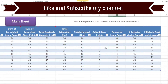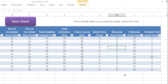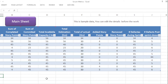In column G you need to add how many total story points were added after the start of the sprint, and in column H you need to mention the total sum of story points which were removed from the sprint. These numbers will be calculated automatically in the scope change sheet. The last two columns show number of defects during the sprint and number of defects post-sprint, which will be calculated in the defect leakage metrics sheet. This is the only sheet where you need to manually maintain your data — all other things will be done automatically.